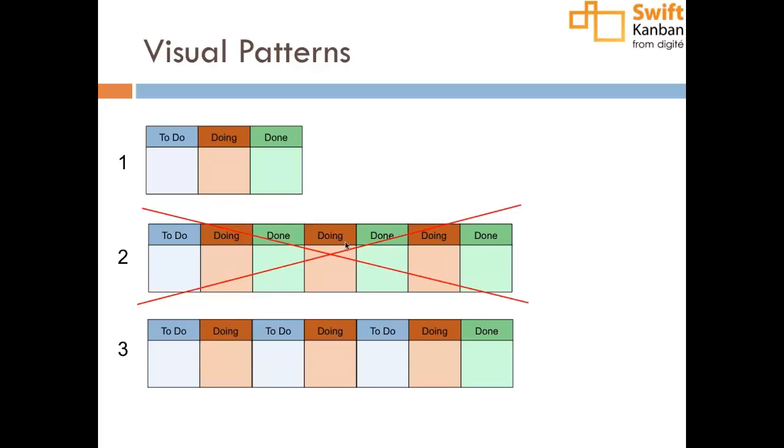But if you had skips, then you want cards to be waiting just in front of where it is done, so that when you visualize, you understand what is the work pending at each state. And also, it impacts the way you compute your metrics, especially if you group these to-do doings into a hierarchical column structure, like design, waiting for design, doing design, develop, waiting for develop, doing develop, and so on.